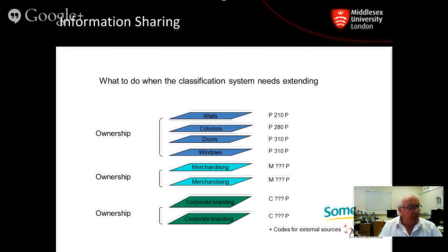Corporate branding was another form of information here that CISFB in that case didn't cope with. So we got together with their corporate branding team, looked at the types of information that they wanted to represent in the databases and on the drawings, and came up with an extension to the CAD standard. So never let the CAD standard get out of control. There should be somebody there all the time who's responsible for it, who's keeping an eye around the project.